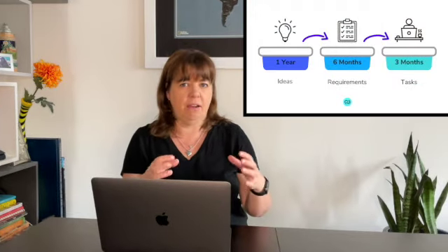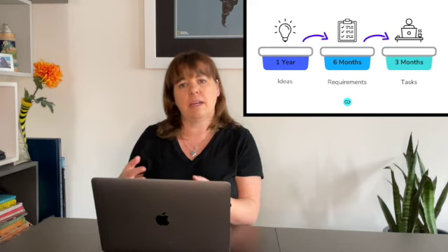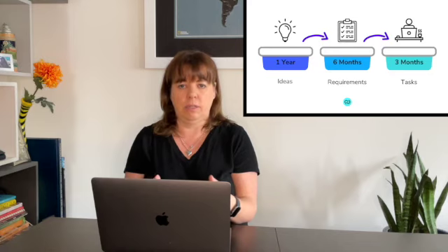For healthcare organizations going through a Scrumban framework, it's not unusual for that 1-year bucket to be assigned after a strategic planning effort, so a 1 to 3 year strategic planning outlook or a large project initiative prioritization round where you have something of significance that is going to be placed on the roadmap for the next year or so. Once you've got something there, the next space that it's going to go to is the 6-month bucket. The 6-month bucket is where a lot of the planning is going to happen and all of the requirements gathering is going to take place.